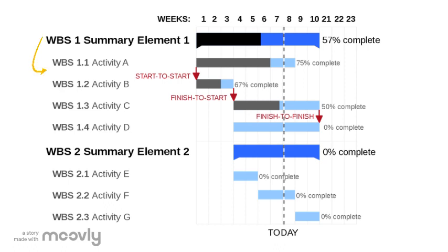As for dependencies, this is the relationship among tasks which determines the order in which activities need to be performed. There are 4 types of dependencies: finish to start, start to start, finish to finish, and start to finish. People and resources are also needed for the function of certain tasks of Gantt charts. For instance, people are assigned tasks by selecting the drop-down menu under resource names.